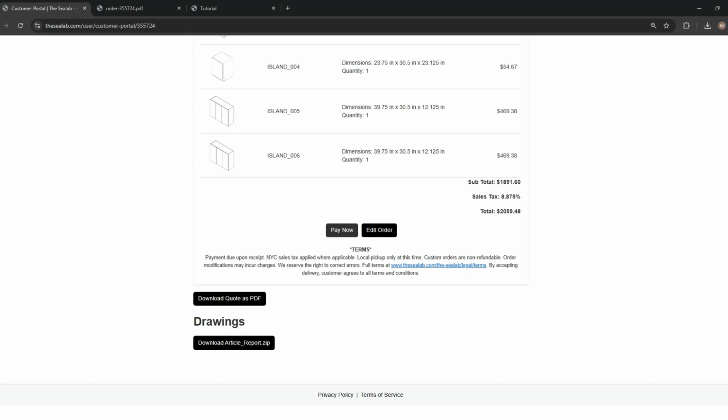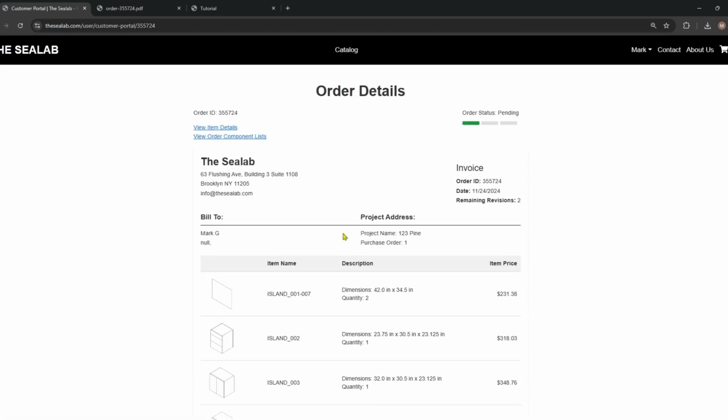And production for the parts typically takes about 2 weeks. If we were adding other components onto this, like drawer boxes or assembly or finishing, the lead time might vary. For the most part, to get CNC parts edge banded, cut to size with all the machinings is about 2 weeks from the time that you place the order.